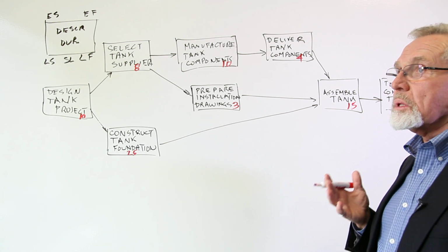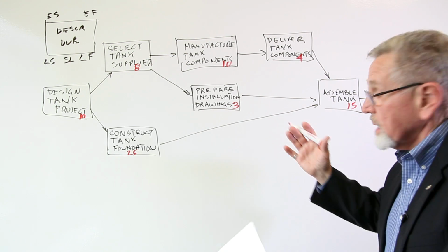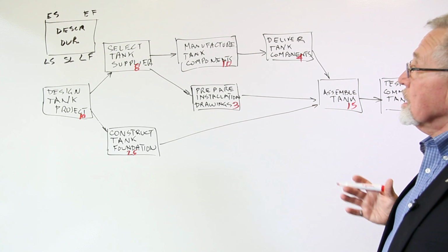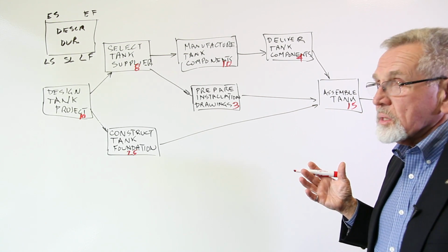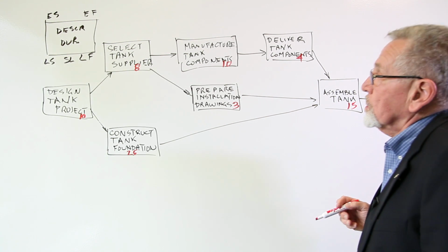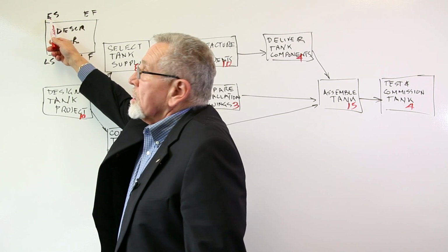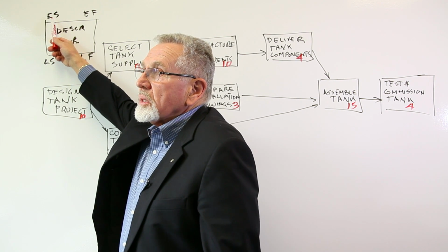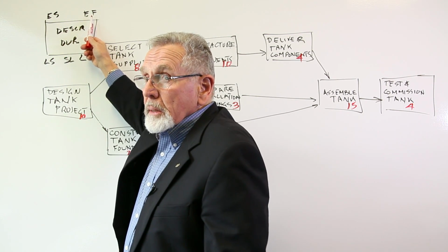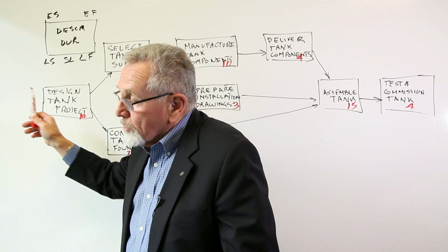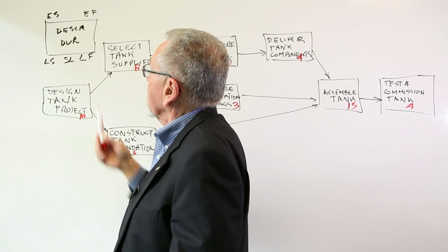Okay, now what's this about critical path? Well, what we're trying to do is determine how long, based on these estimates and based on the sequences, this project is going to take. So, some very simple calculations to help us do that. We define four parameters, if you will. We define something called an early start, the earliest that the activity or the task can start, and the earliest it can finish, based on the predecessor activities, based on what has to come prior to that activity.